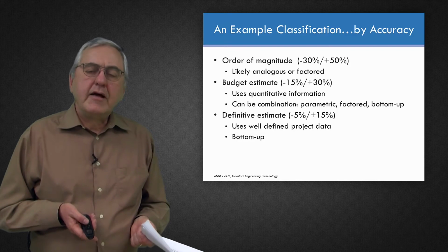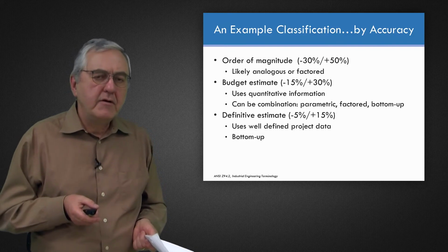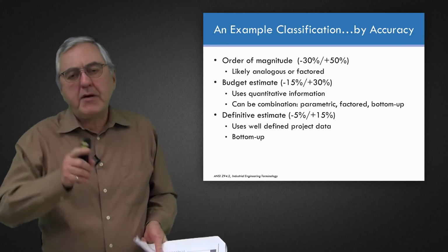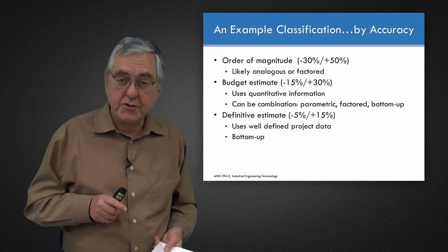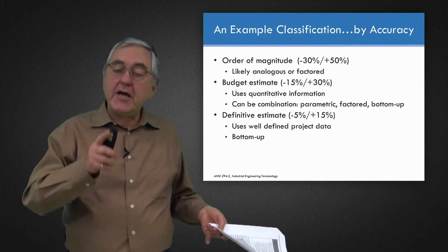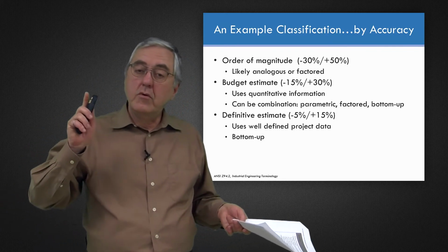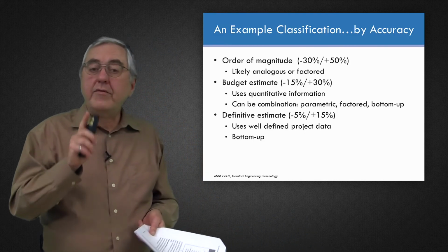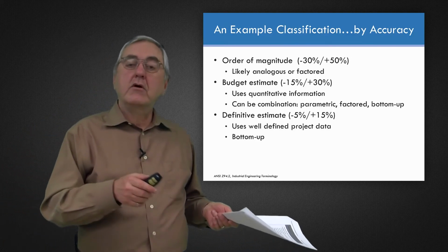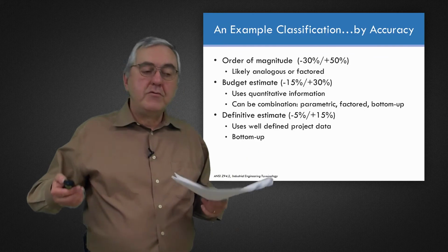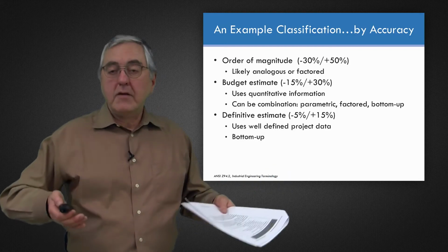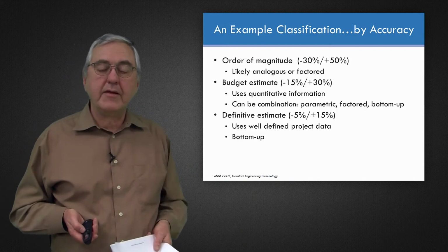The important thing is that in your organization, there is a way for you to express the accuracy. You could express the accuracy of the estimate by saying percentages, -30%, +30%. You could explain the accuracy by saying a range, $900,000 to $1,150,000. Or within your organization, maybe there's a common understanding of what labels mean, like budget estimate, order of magnitude estimate. The important thing is that when you do publish a budget, there is a clear understanding of the accuracy associated with it.